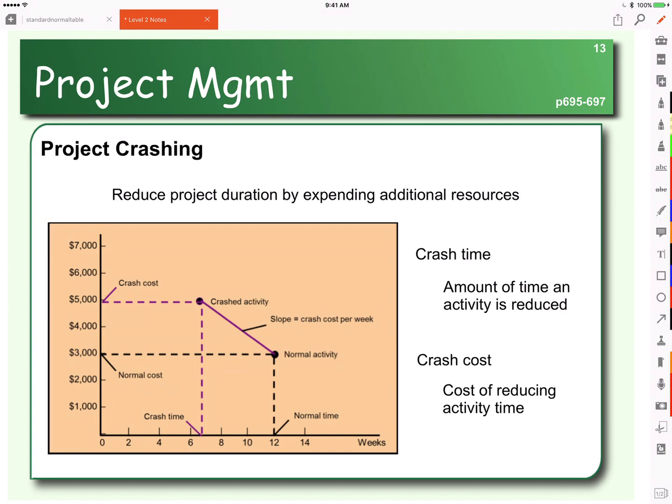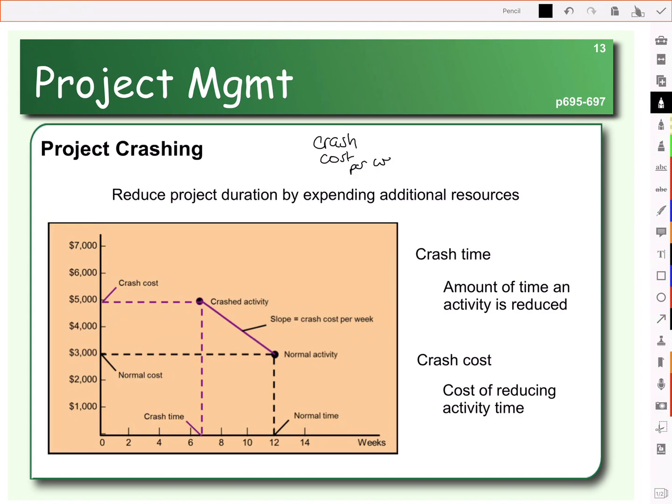So we can actually calculate our crash cost per week by looking at the crash cost and dividing it by the amount of time we can reduce the activity.